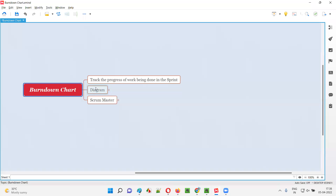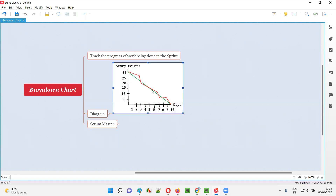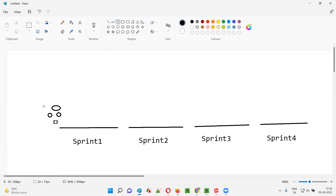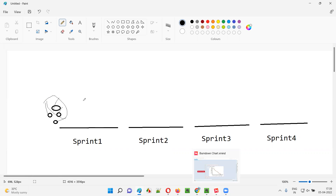So how does the burn down chart look? On the vertical axis, we mention the story points — the total number of story points of the user stories assigned to a particular sprint. For each user story there will be estimated story points. If you calculate all the story points of user stories assigned to a sprint, for example, you might get 30 story points total.